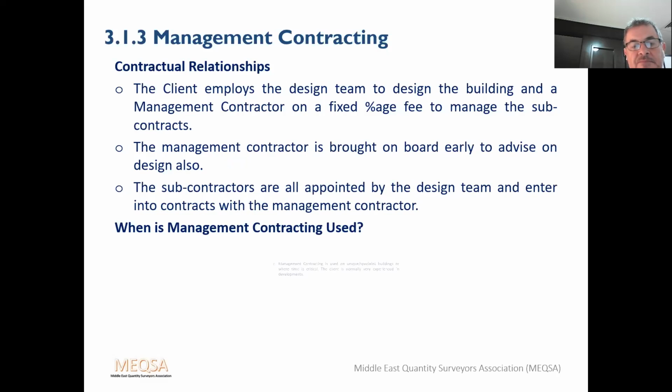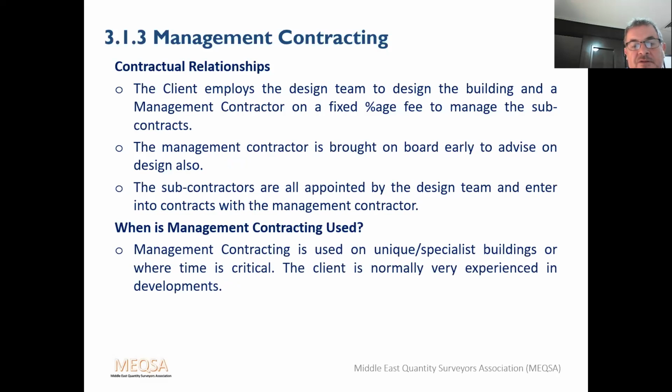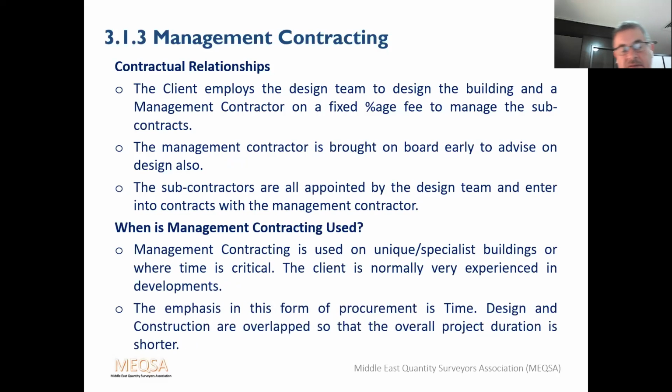When is this used? It's used on unique specialist buildings or where time is critical. The client is normally very experienced in this type of development. In fact, if they're not experienced, I would strongly advise not to use management contracting. And the emphasis in this form of procurement is time. The design and construction overlap so that overall project duration is shorter.